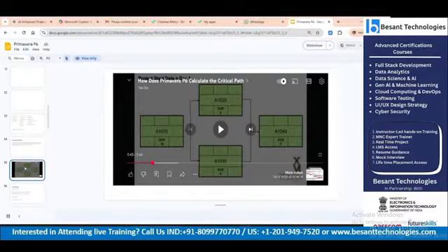But in certain scenarios, even if the activity is delayed by 2 days, it won't affect the subsequent activity, because there is a buffer, which means there is a float value of 2 days. If we have a float value of 2 days, the activity can be delayed by 2 days.